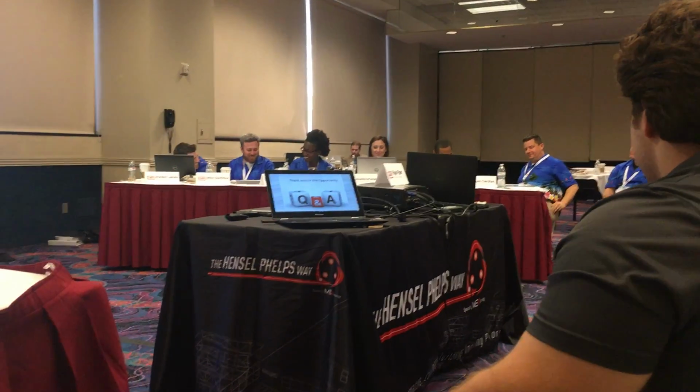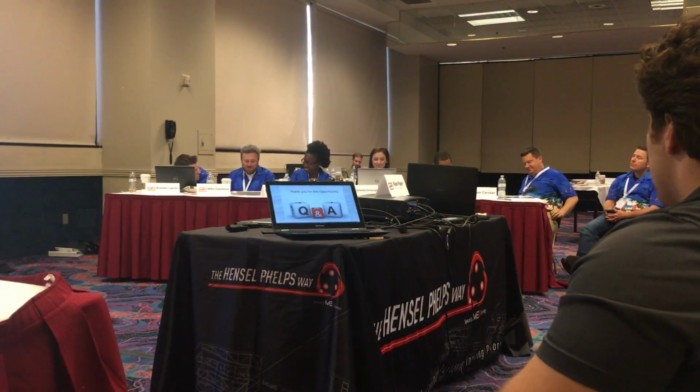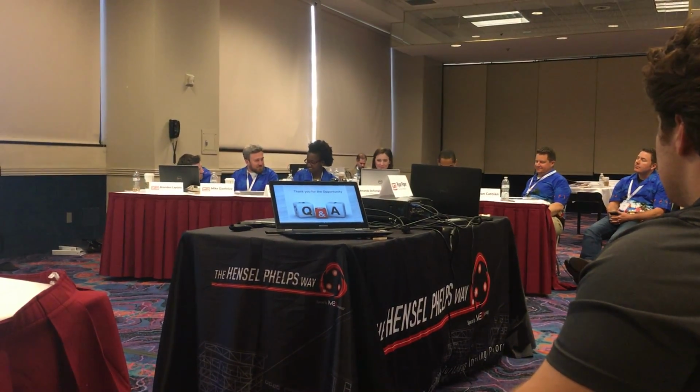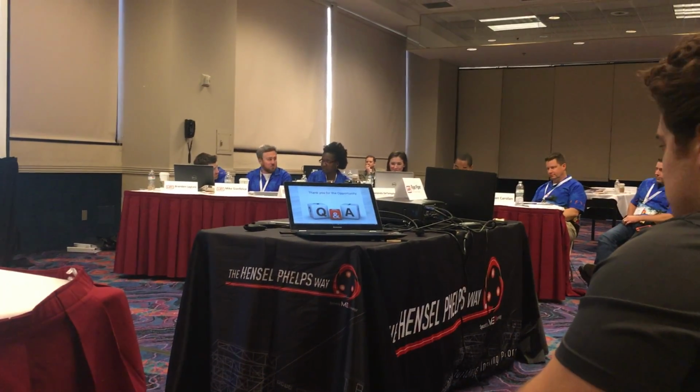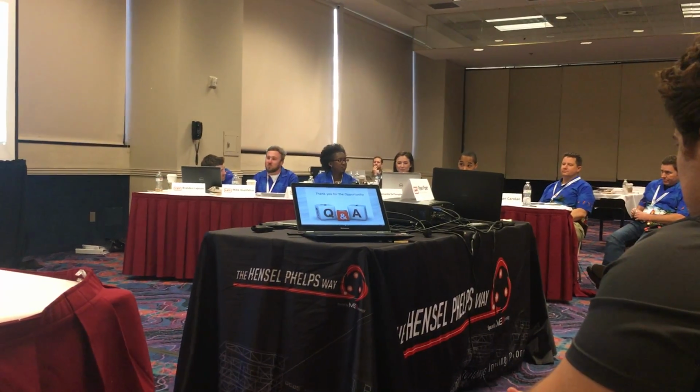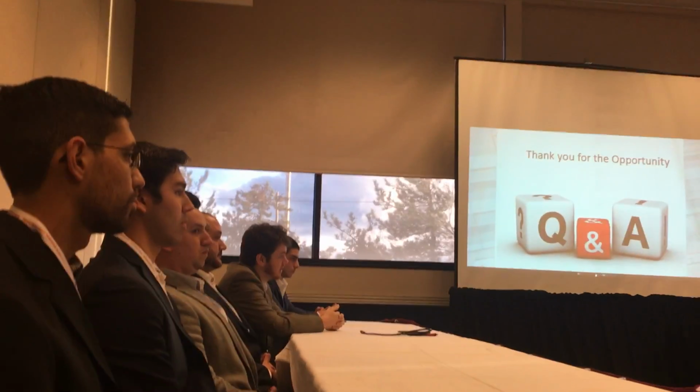Under your mobilizations, you have an item in there. I'm sure Brandon will ask about it. But on your first level, you build out your temp offices. Yes. All right. But I didn't see an activity for removing those temp offices. So when do you plan on getting rid of that in your schedule?